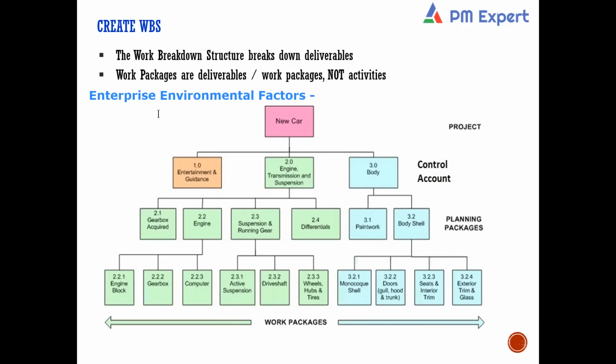Now, if your project requires a skill which is not available within the organization, then will training be required or not? Will there be extra cost? And there will be extra effort, right? That extra effort should also come as a component of the work breakdown structure, right? Yes. Is it fine?